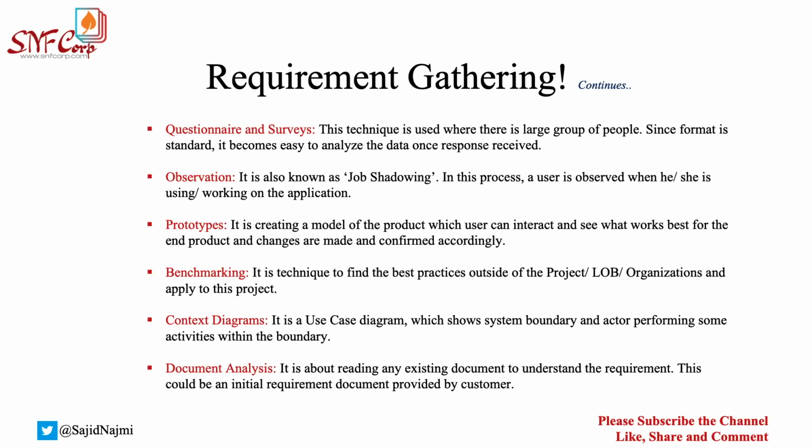So you will create a set of questions and you will send the same set of questions to all the groups at the same time through email or through any of the sources that you may want to use. And then everybody will be answering the questions and sending them back to you. So this becomes really helpful when you have a large group of people across the globe or wherever, basically not at one place, and you don't have that much time to go and interview them individually. So you create this questionnaire and send it, and you collect the responses and you analyze them.